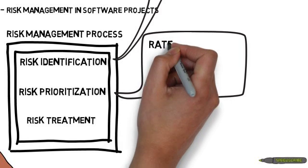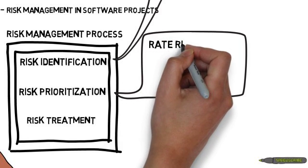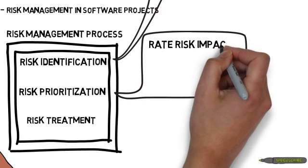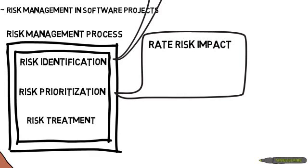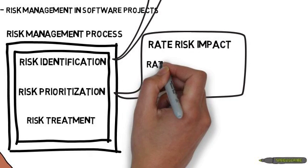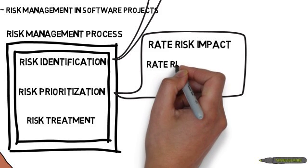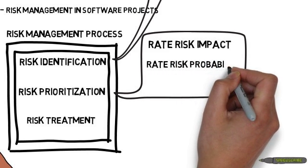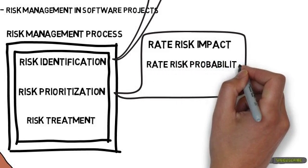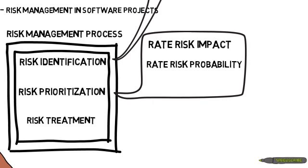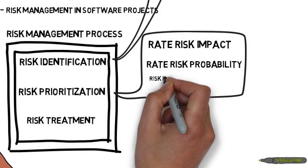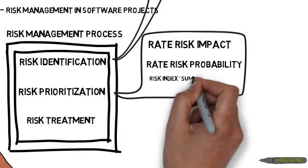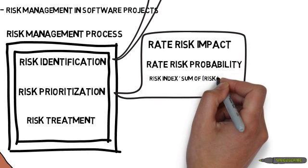Risk prioritization is simple if the risk is understood correctly. There are two things to consider: risk impact and risk probability. You can give a rating of low, medium, or high to each one, and multiply them to give you the risk index for each particular risk.